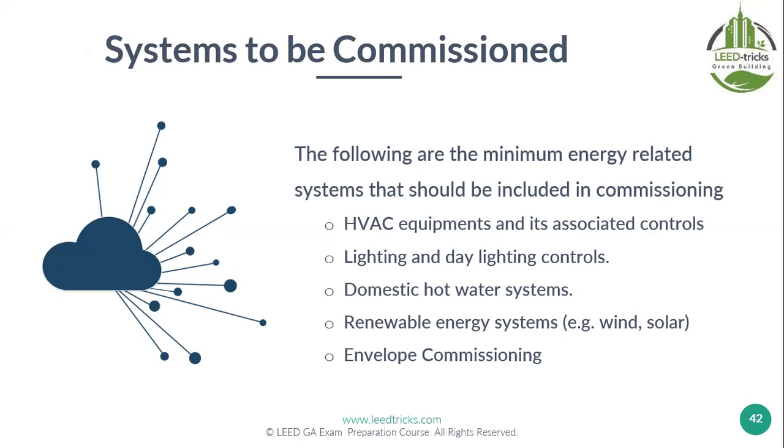The commissioning scope is big, you can commission any system you want. Here in LEED, I tell you what systems to be commissioned, meaning what you will do commissioning for. So: HVAC equipment and associated controls and sensors, and so on.